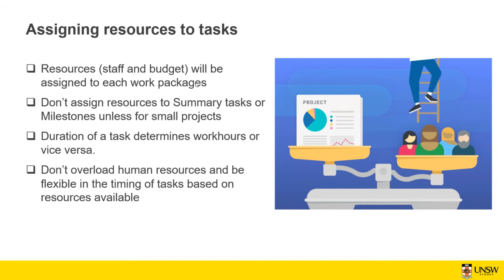The example of a start to start does not necessarily look like a finish to start one. For example, with finish to start, you can finish a task and have like 10 weeks of not doing anything and then start another task. But a start to start means that both tasks need to start at the same time. So this is the difference. Or when one task is started, another task can be started as well.